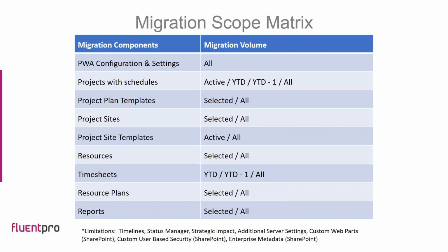For example, enterprise calendars, they have a huge impact on project schedules, and differences in calendars may cause shifting the schedules, dates, start and finish dates.